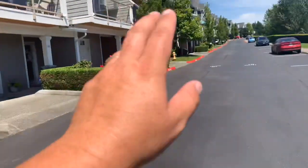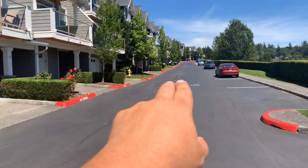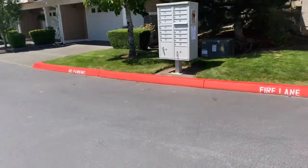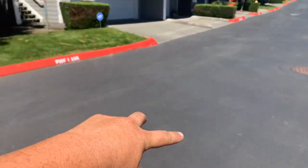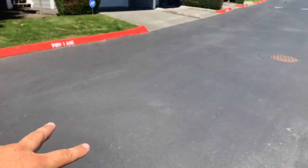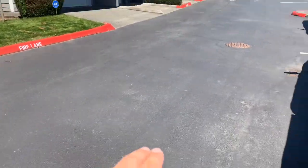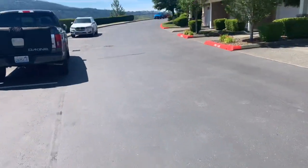All right, so we already talked about blacking out and seal coating over those 15 mile per hour stencils. We talked about that hydrant marker there. This is where the 15-mile-per-hour stencil needs to go. It goes right in front of the mailbox. So just like we did there, we need to move that down to here. Do the same thing, but down here. And they're going to be 24-inch stencils. So you got two 15-mile-per-hour stencils here, two of them up there at the intersection. Okay.